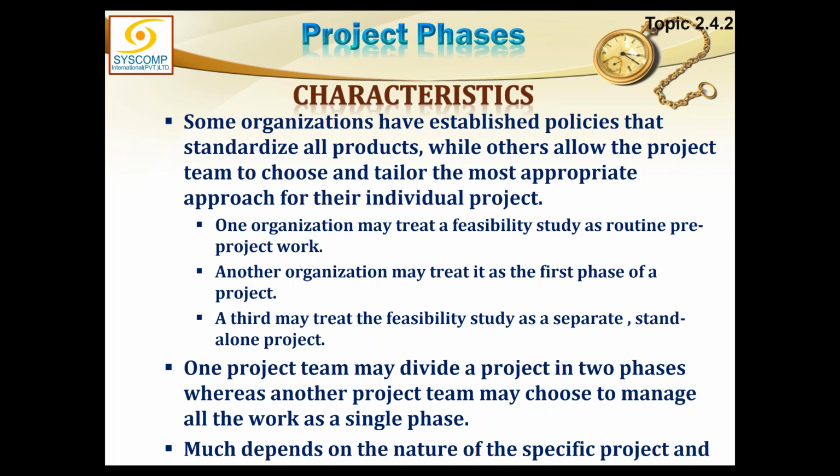Not in my project. There was another project in which 5 radars were being done simultaneously. In that case, it has to be sub-projects under the phases, because phases cannot overlap. Sub-projects can overlap, they can even start together and finish together. Phases can have overlap, but only a little. We recommend that it should be minimal.